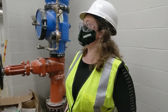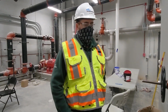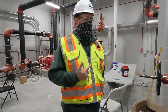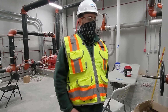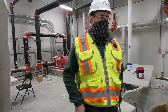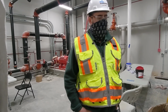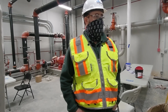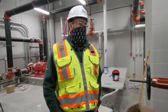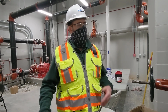What were some of the important on-site quality checks that you guys had to go through? Right, so on any given project, there's a difference between code required and specification required QC. So that's the most important thing, is differentiating between those two. On the job specifically, we had to do water testing, air testing of all our lines, obviously testing of all our electrical gear, and making sure that substrate is free of moisture and relative humidity. And then also, when we were doing our prefabricated racks off-site, we had a testing process where we tested them before they even came out to the job site, and then they'll get tested again once they're tied in and installed.